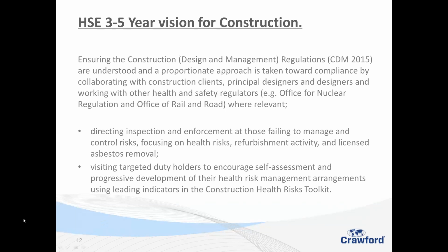We have problems where we're not allowed to use the policyholders' facilities. We're unable to put anything bigger than a toilet outside, so we've got no resting areas, and that's where we have to think outside the box, unfortunately, because we can't put a welfare facility on a one-way system or a one-way road, etc. And I'm sure these are problems if you're doing civils in city centres and town centres, that you're coming up against this. My great belief is, again, do as much as you possibly can to meet the regs. Document everything. Document why you can't use the facilities that are on site, and why you've done what you have done.